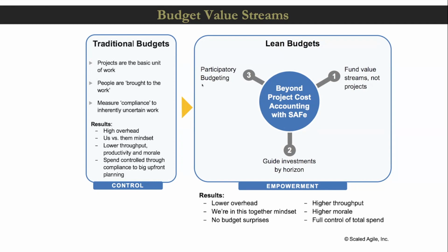So by empowering your release trains, empowering the value streams, you've now lowered the overhead. Nobody's talking about how much money you're going to need. There's no change request process in play because every 2 weeks you're going to be able to demonstrate something and get funding for the next 2 weeks. In every PI, you're planning for that 10 to 12 week period. So you've reduced the overhead.